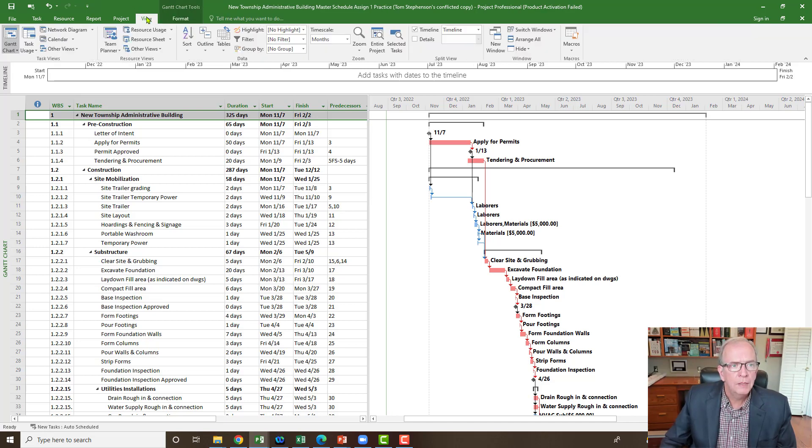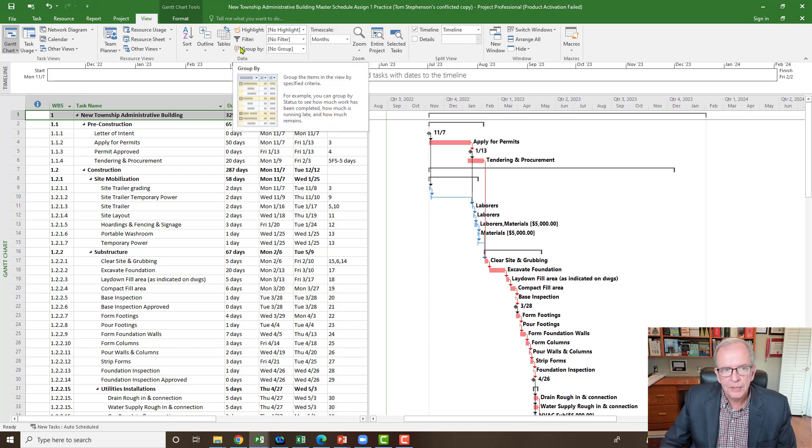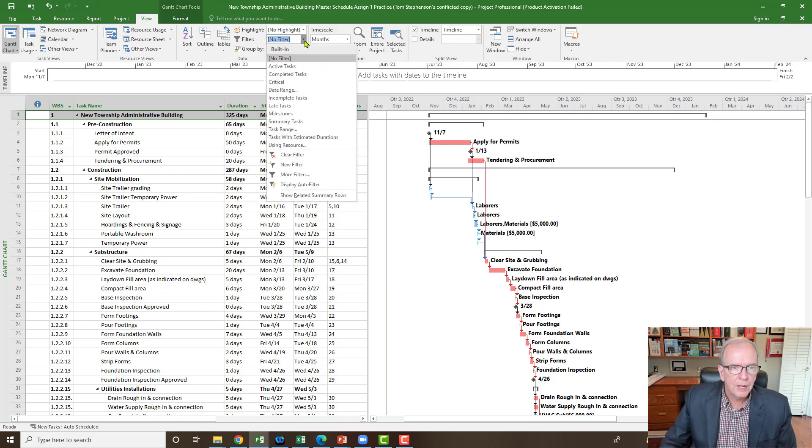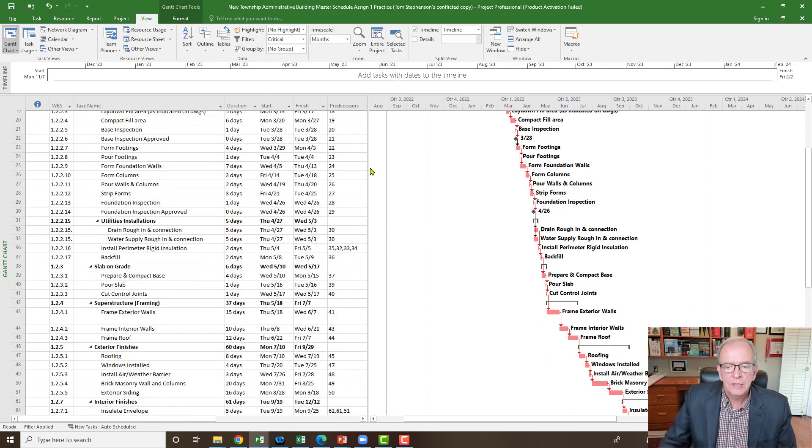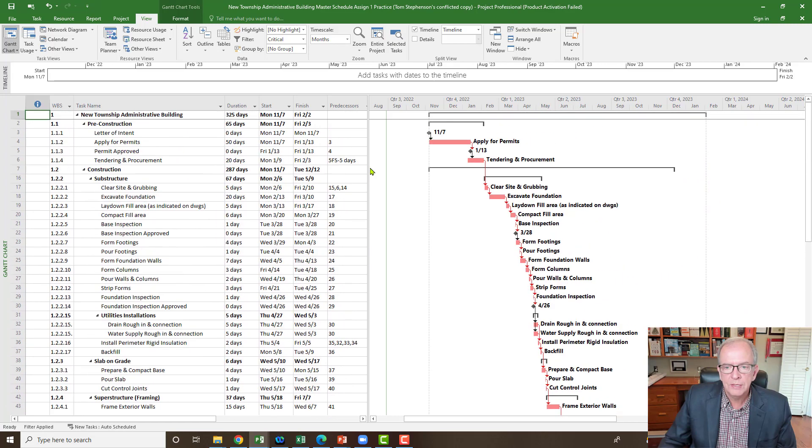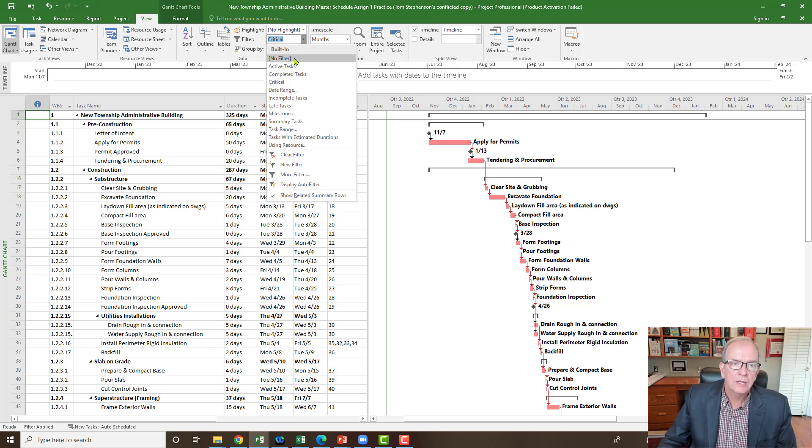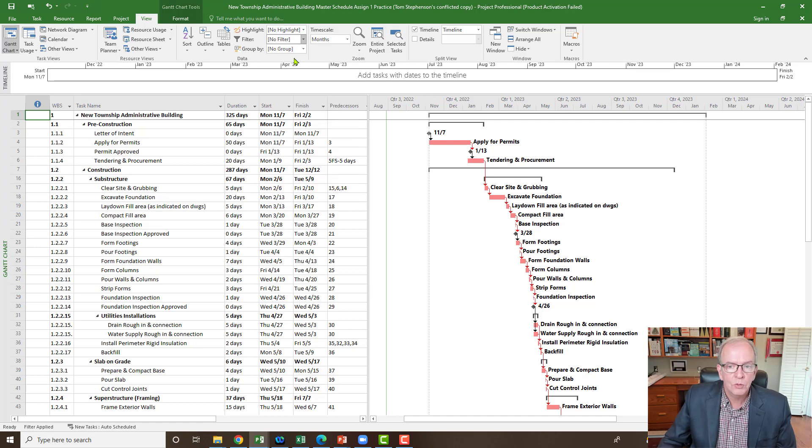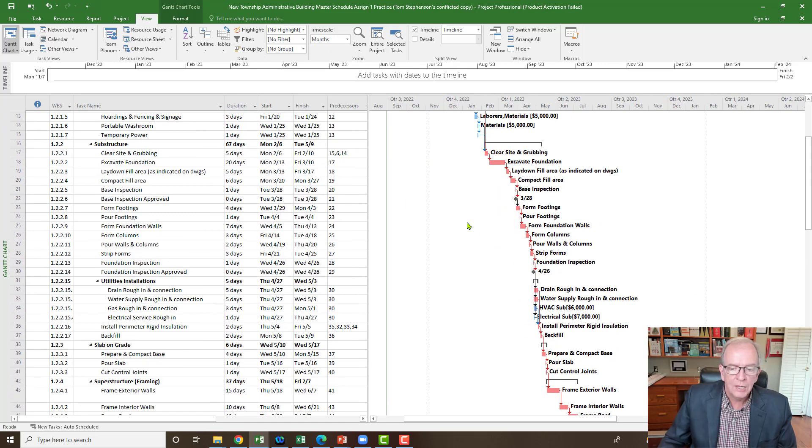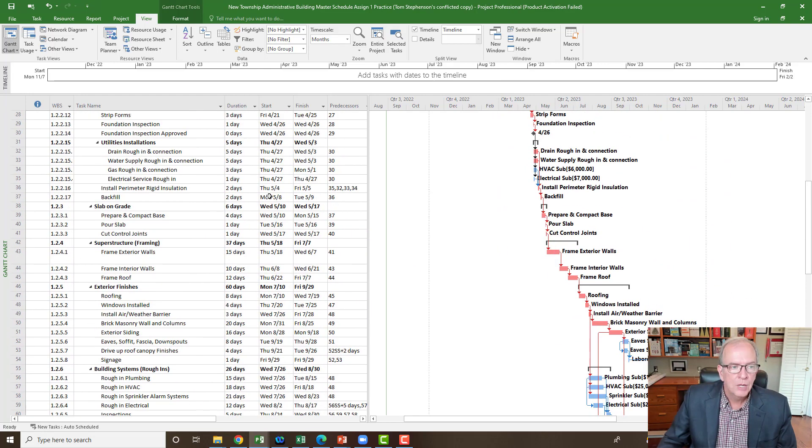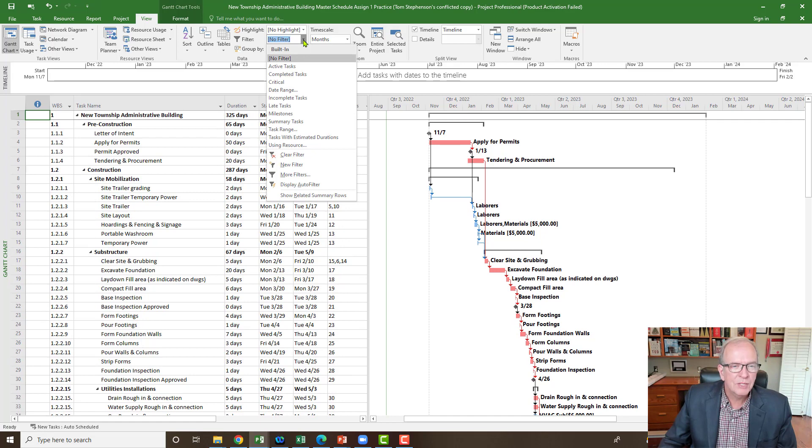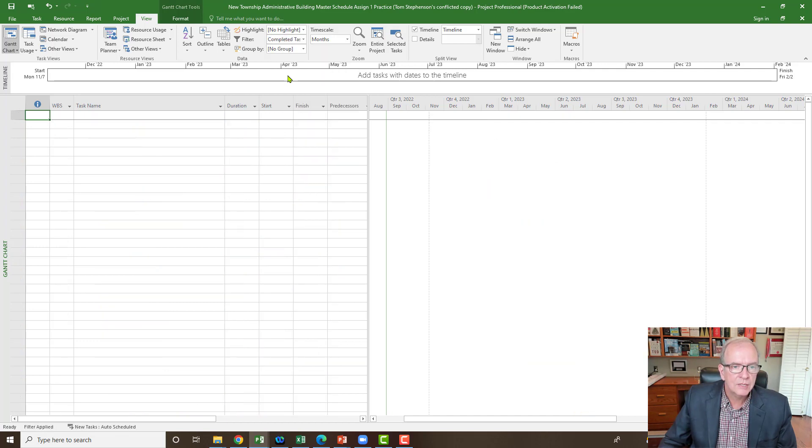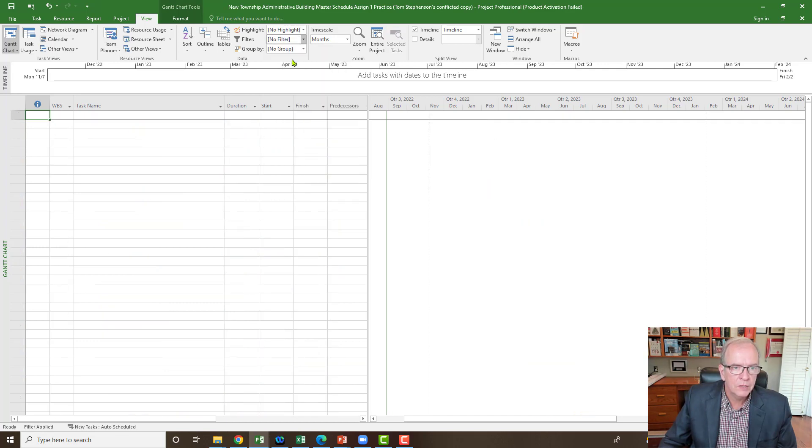Under the view tab, this is where there's a lot of stuff that you can filter for, right? So there, and you can highlight and you can group by. So these are interesting things. So to filter by, you can filter by critical tasks, right? So let's show critical tasks. So that's all I see on my product. You don't see any blue activities, right? So only the critical activities. Remember, critical activities are the activities that form the longest path through the project, right? So when we're looking at the network, they're not the activities that have float mixed in, like the blue ones do here and there that you see. Okay, so I could filter by critical activities. Remember, it's filtering that information out. I could just show me the completed tasks. Well, in this case, it wouldn't show anything because I don't have anything done yet. I'll show you on a more advanced one in a minute.